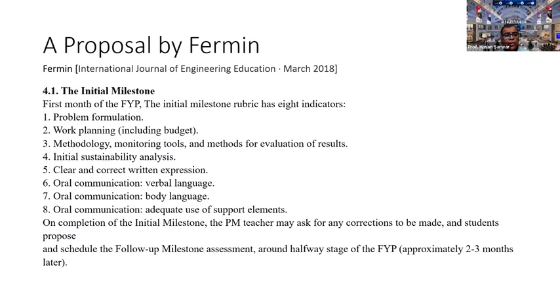And on completion of the initial milestone, the project management teacher may ask for any corrections to be made, and students propose and schedule the follow-up milestone assessment around the halfway stage of the FYP, approximately 2-3 months later. So this initial milestone has 8 indicators, and it is understood that the project management teacher actually has some contribution in directing the students toward the right track.